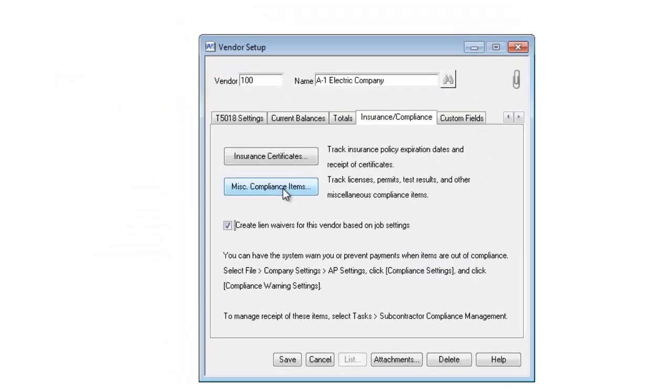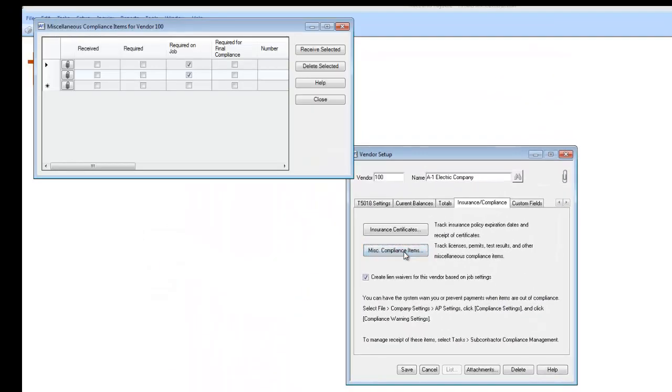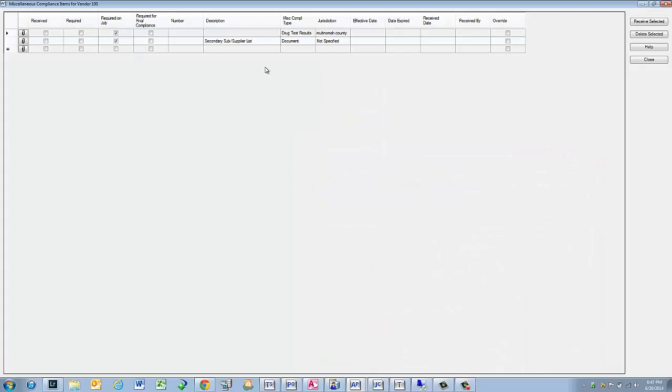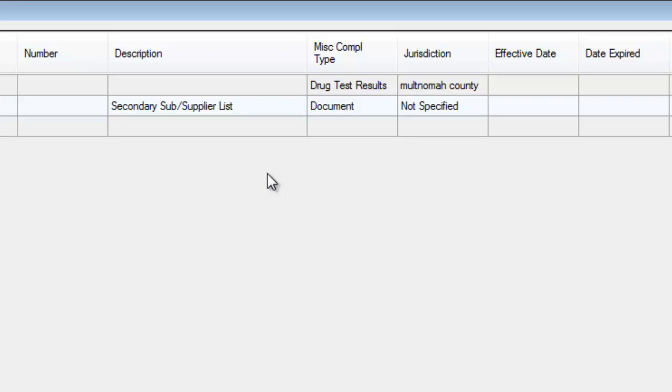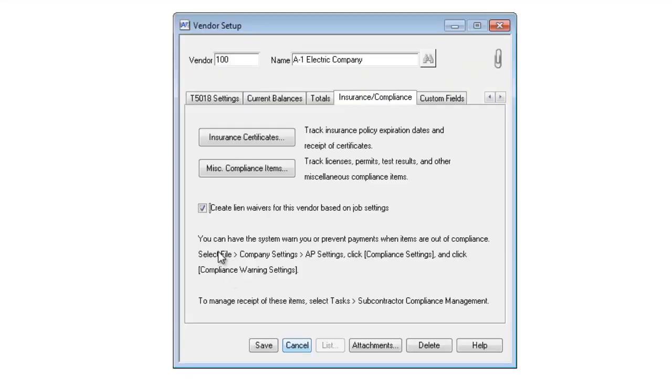I can also put miscellaneous compliance items. For this particular vendor, I need to have drug test results if they work in Moulton, Noma County. I've selected this checkbox here because I want this vendor to have lien releases created for it based on whatever job they're working on.